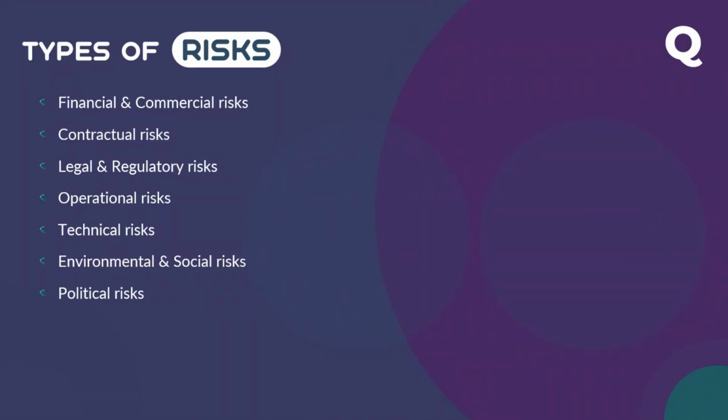So ideally, the client has to provide you the environmental permit to start the work. Just imagine you're developing some place and there is a mangrove or a palm tree and the client tells you to cut and remove it. That's a risk for you, because it's not just about cutting and removing. There are approval layers, environmental approvals, different ministries, everything. That's a cost impact also. And when you remove one mangrove, you have to replace three mangroves also.